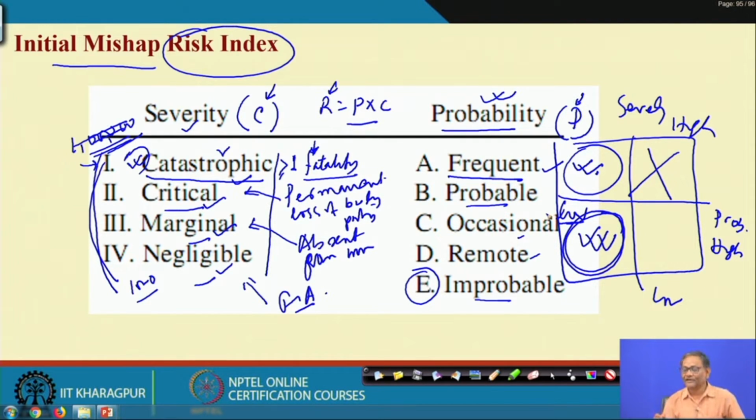and you find that in general day to day activities will fall under this. And here probability high and severity low, that may be there. Here you reduce the probability. So, action here, I think it is an inoperable system, action here reduce the catastrophic nature or the severity, action here reduce the probability. I think the risk level here will fall under the acceptable zone.